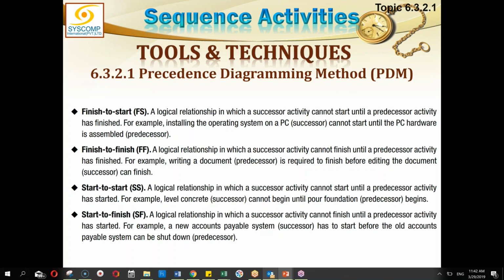Any activity which can be done in parallel. For example, during construction of a house, I need to build the foundation. On one side, I have to get the delivery of cement, and at the same time I can also get the delivery of sand triggered so that we can mix. Assuming that the source of both materials is at the same distance from my construction site, once the delivery of cement starts, at the same time I can do it for sand as well, and once they are both at the site, I can start the mixing or something like this.